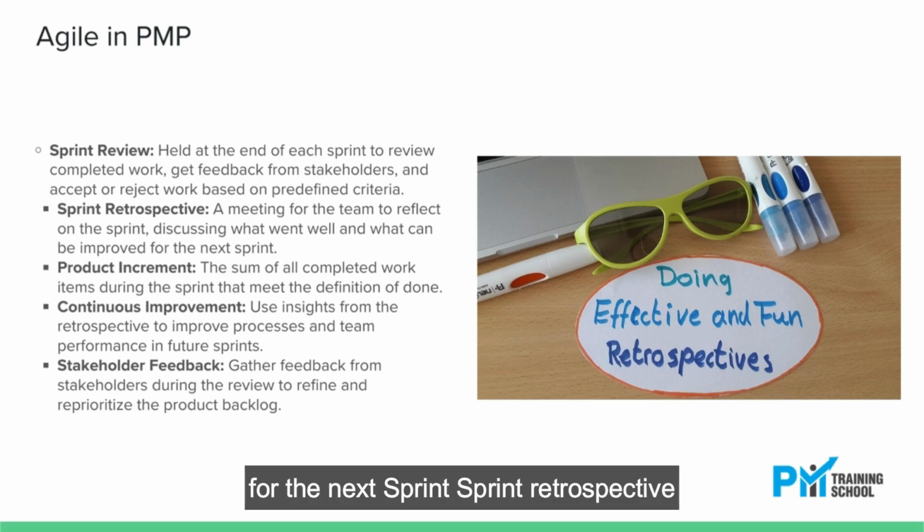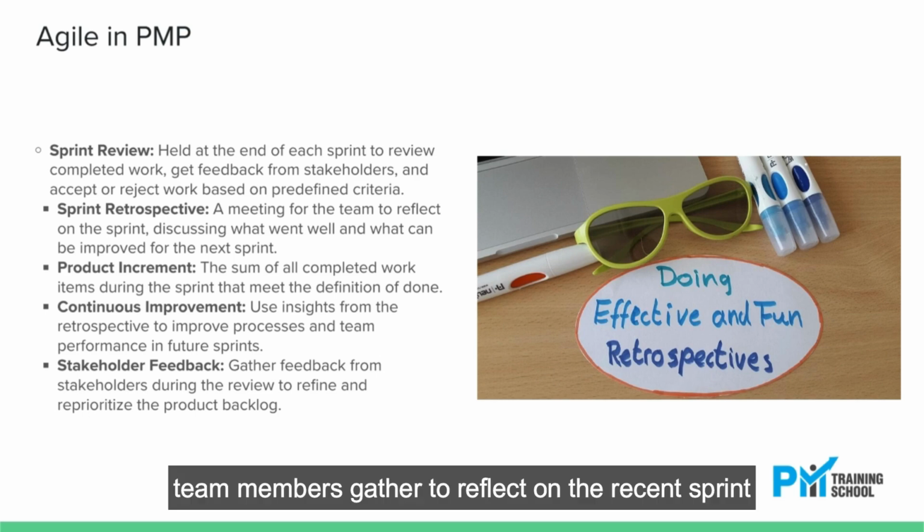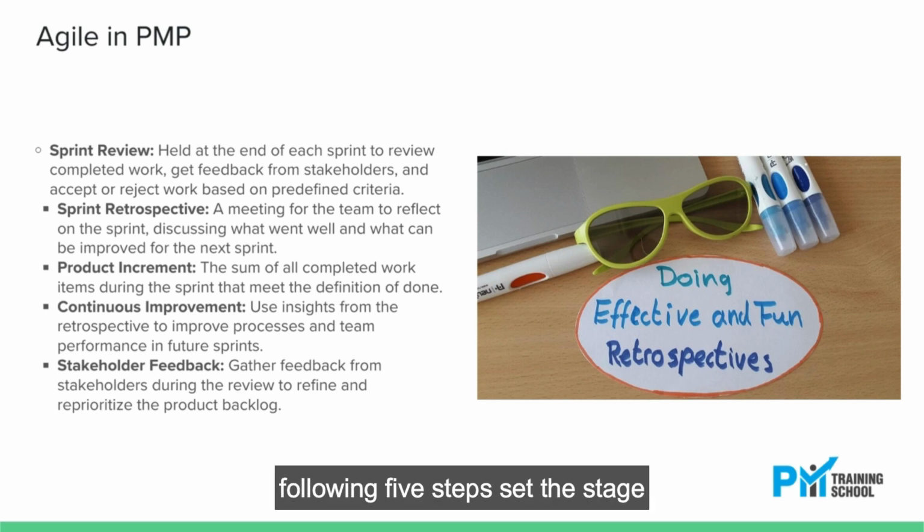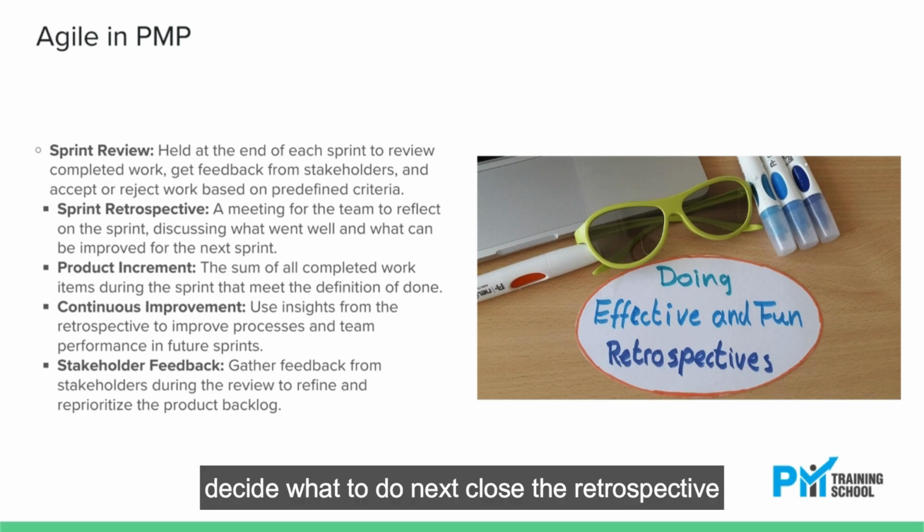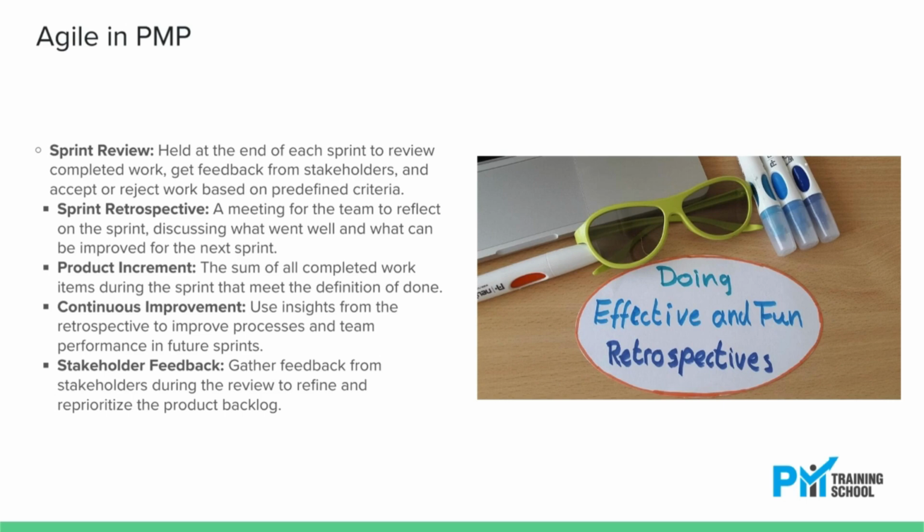Sprint retrospective. Team members gather to reflect on the recent sprint following 5 steps. Set the stage. Gather data. Generate insights. Decide what to do next. Close the retrospective.